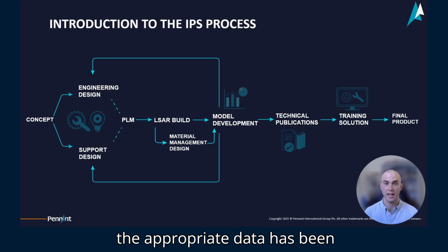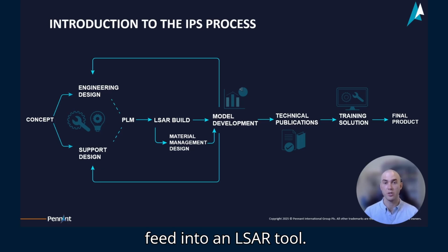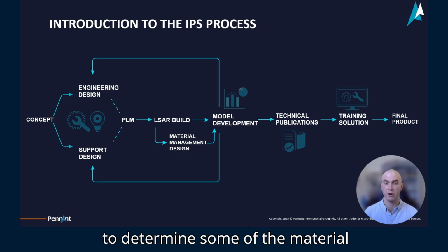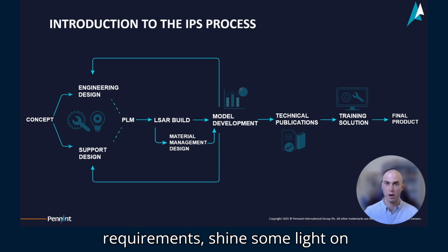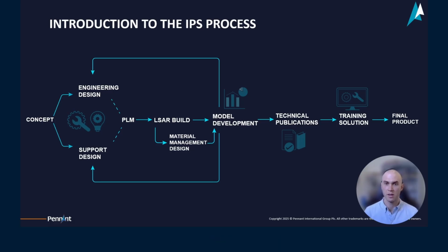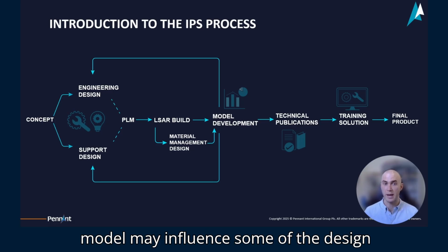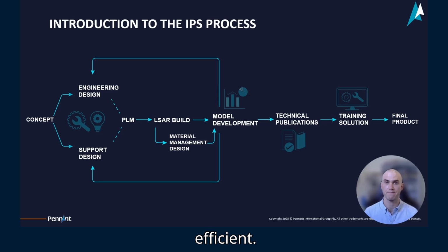Once the appropriate data has been populated, that will then begin to feed into an LSAR tool. That LSAR tool will help to determine some of the material management and supply support processes, as well as feed into a supportability model, which will help to determine sparing requirements, shine some light on lifecycle costing, those sorts of things. Depending on the output of this, the model may influence some of the design factors as well to make that more efficient.